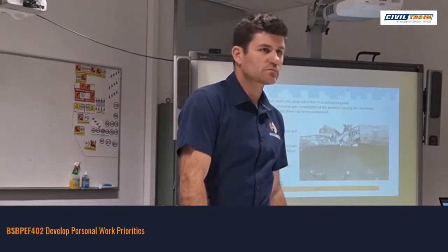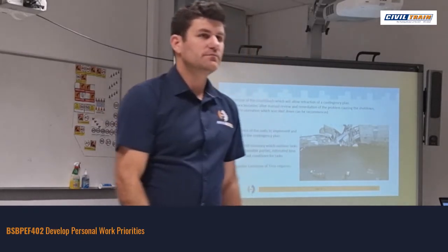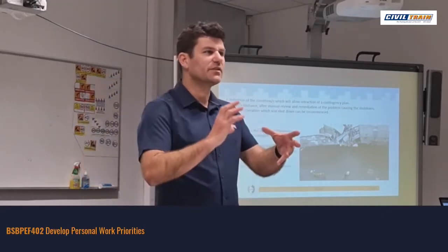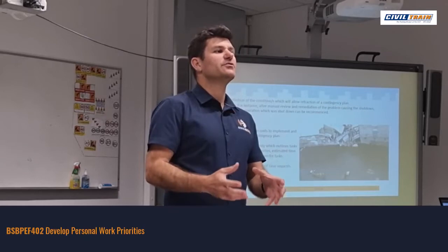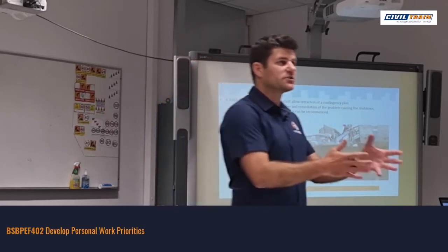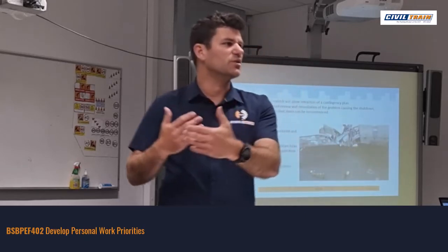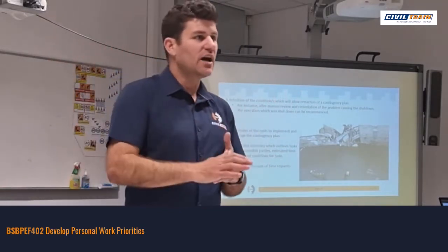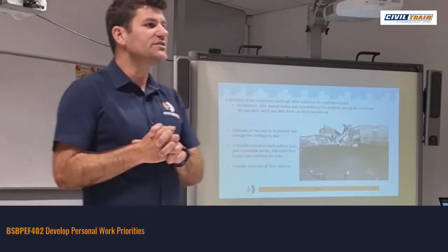Too many people working over each other, depending on what job you're doing. Like, there's no point one digger having 8 blokes spot him. Yep, and that's it. Trying to catch up by putting more resources into play is not necessarily always going to fix that. You might not actually have the physical materials on site at the time. You might catch up that quickly, then now you're waiting on materials, so you can't actually progress forward. So there's a lot of aspects that can cause issues with that. As you said, too congested. Other activities are dependent on others, so it doesn't happen in time. So it can obviously work and it can't.